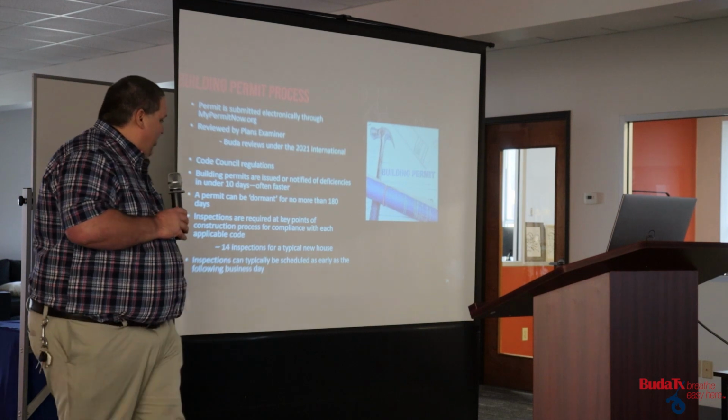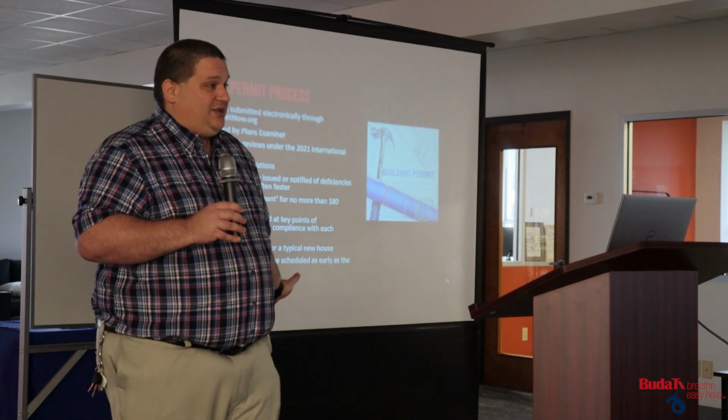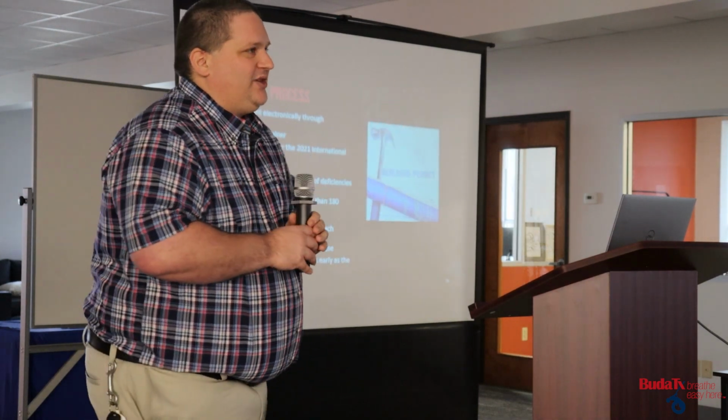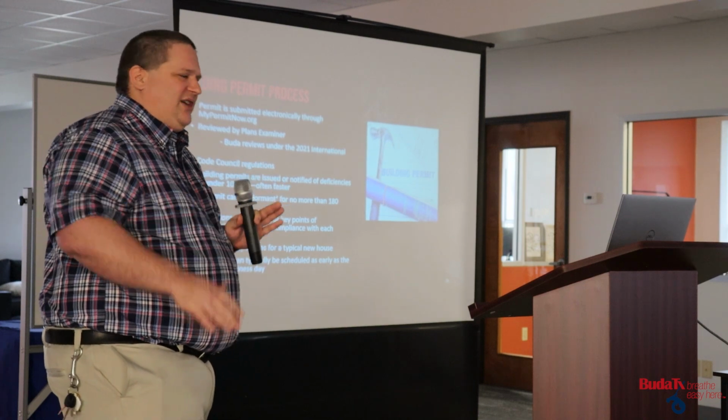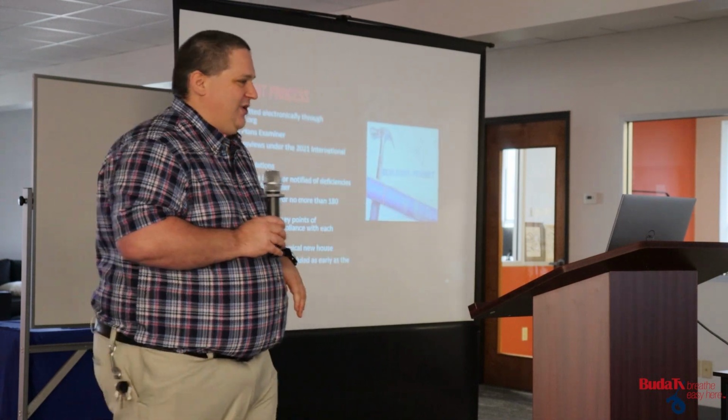Usually inspections can be scheduled as early as the next business day. We have 3 inspectors, 2 for most projects and 1 for site inspections. So different kinds of inspectors, but they are very responsive. Typically, if you ask for the next business day, we'll do it. And we actually just recently got My Government Online to take out city holidays on the inspection scheduling. So like, we're closed on Monday. If you try to schedule an inspection this coming Monday, it won't let you. So that's a new change we're happy to have.